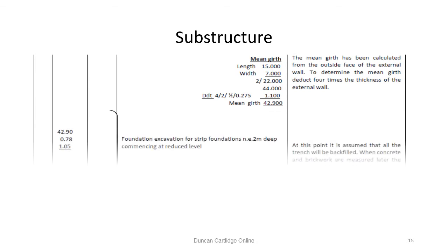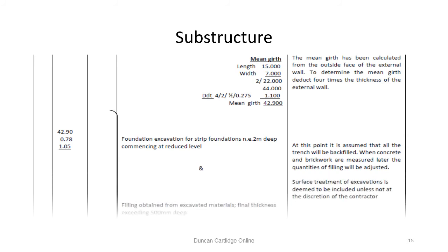Multiply by 2. And then deduct 4 times, twice times, half times the thickness of the wall. In this case, 275mm to give us 42.9. A more detailed explanation is included on the next two slides.